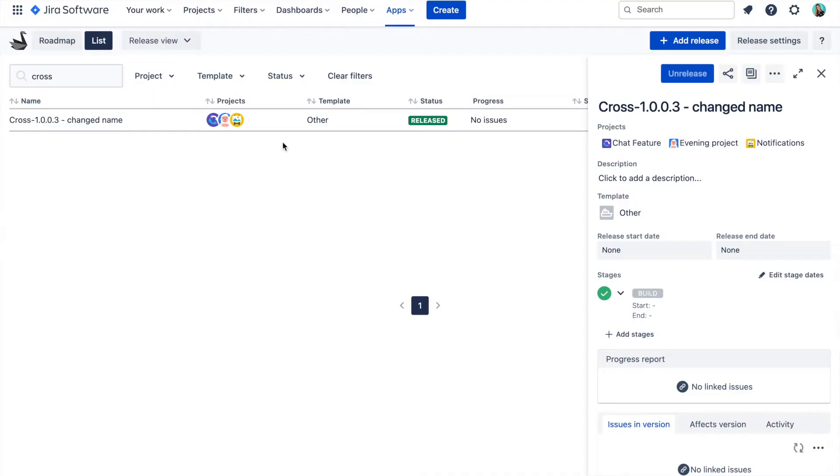The version attributes that get synchronized are version name, description, release start date and end date, and the release status together with archived and unarchived options. The only thing that doesn't get synchronized is when we delete a version in one of the projects.